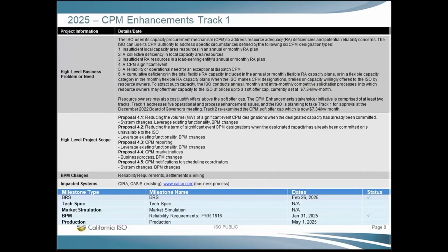I think the short answer is that we had more testing than anticipated, or it went past when we would have liked testing to go past to allow us the time to fully prepare for production. And so because the gap between our finish of testing and the activation date of 4.1 was too short, we